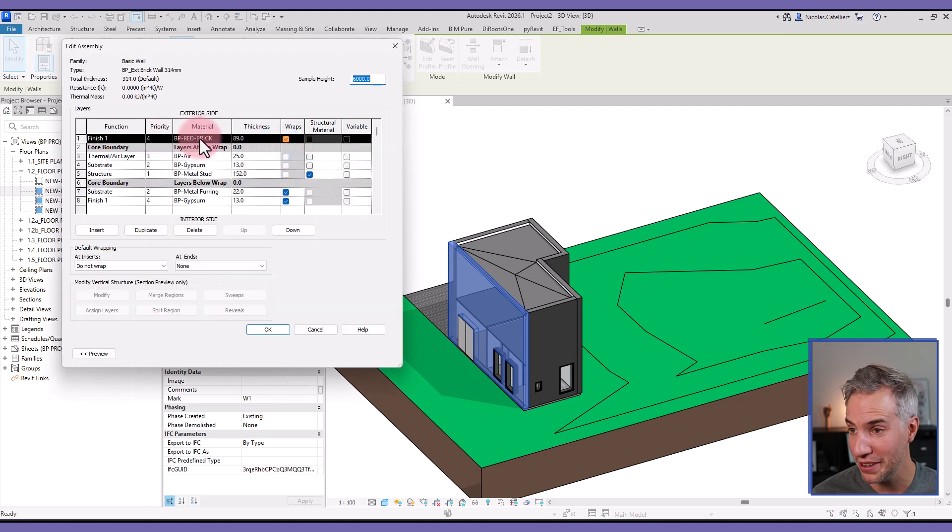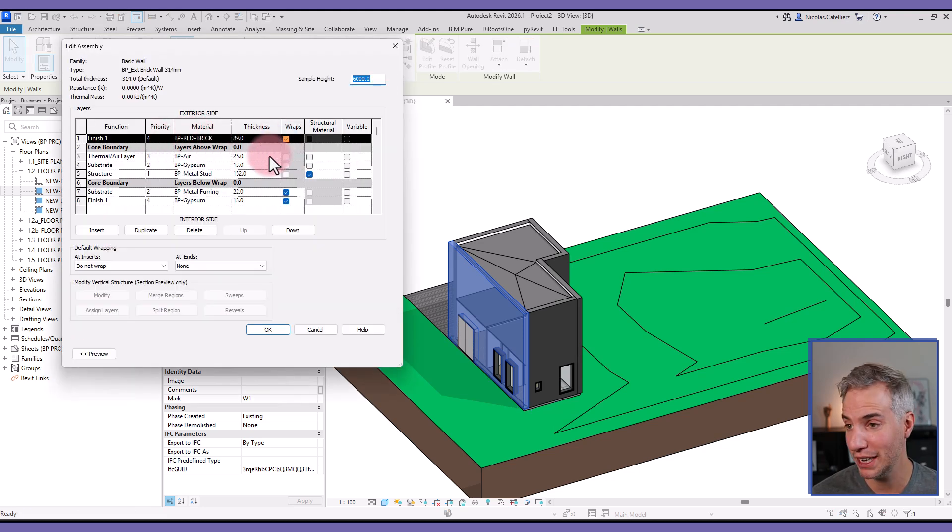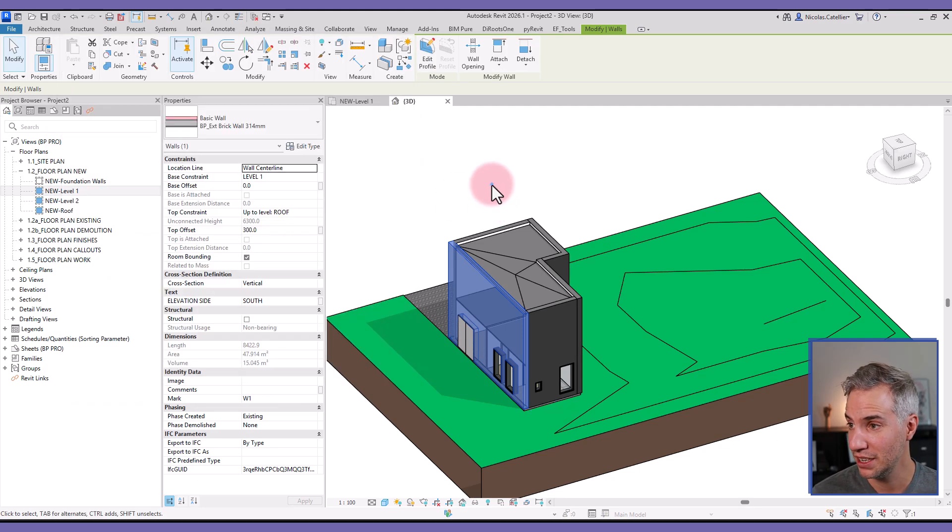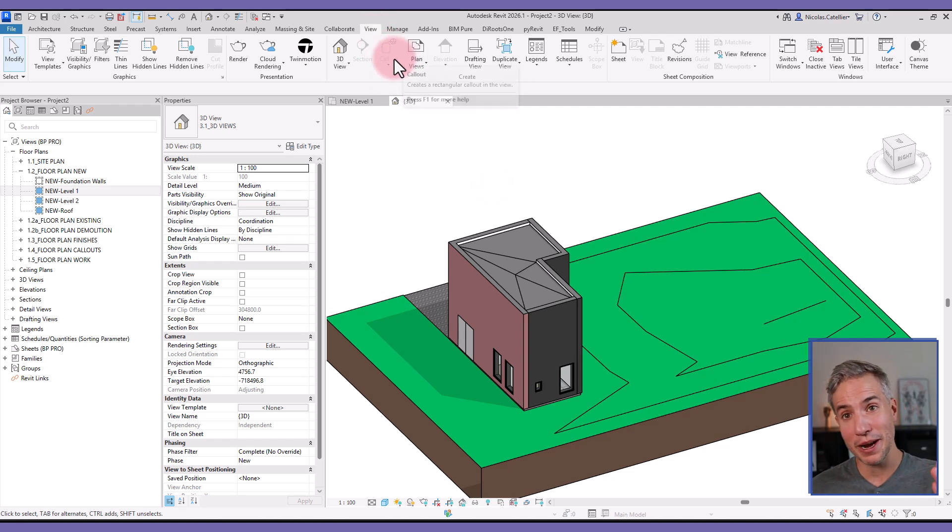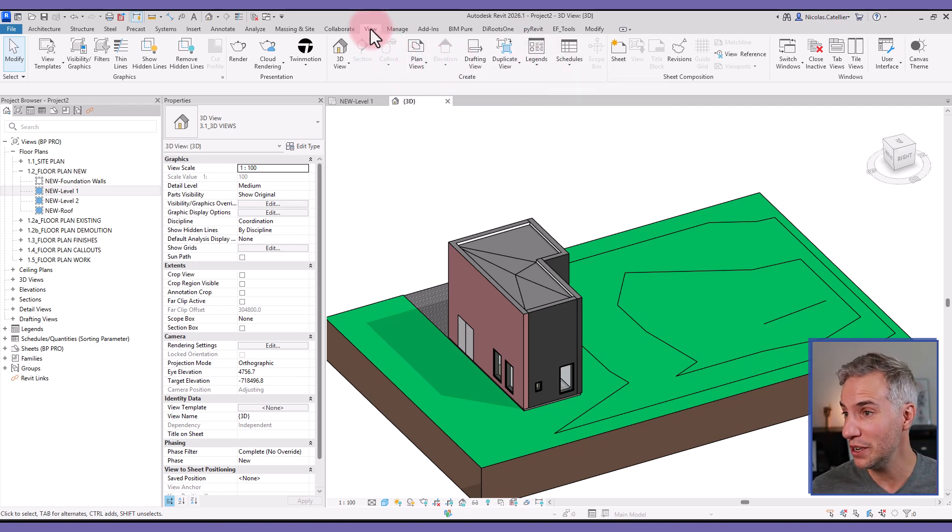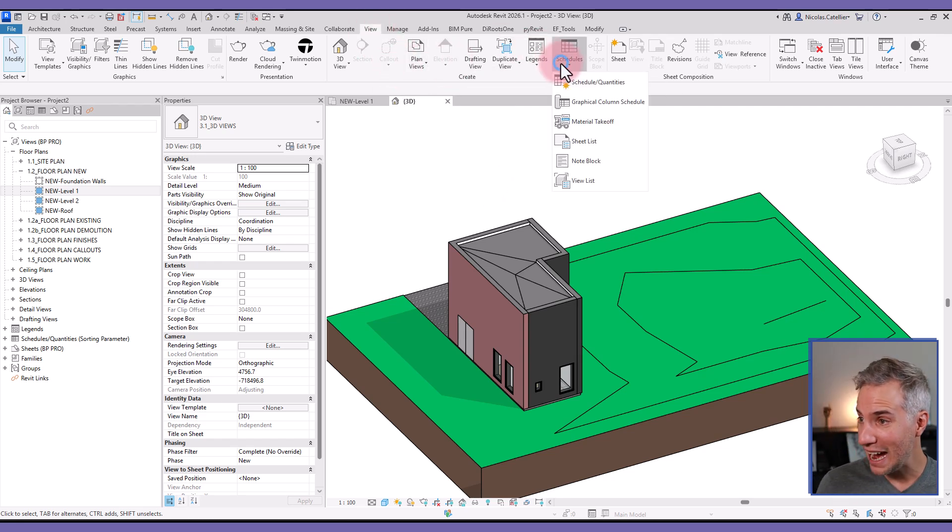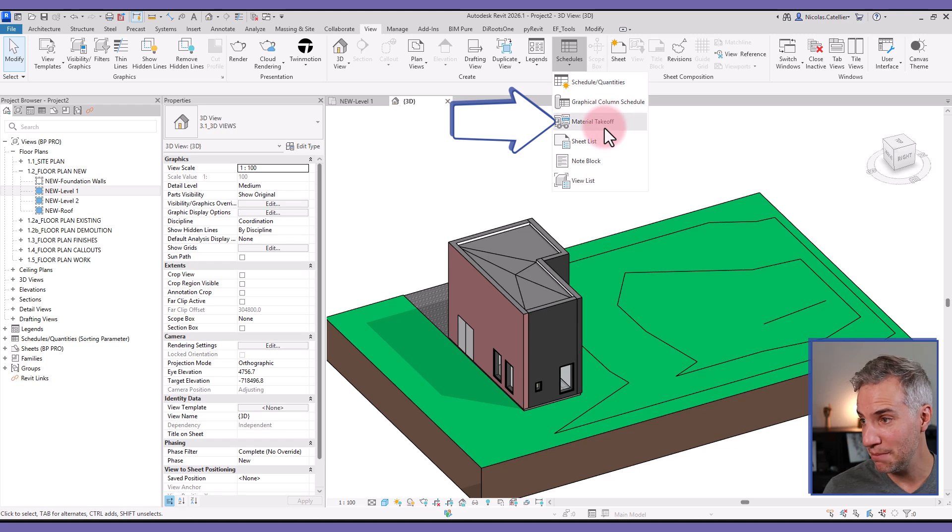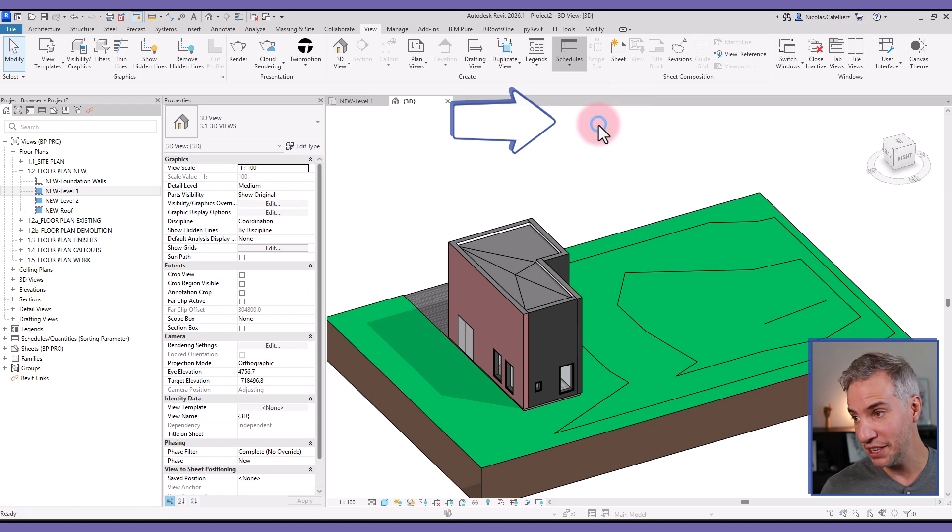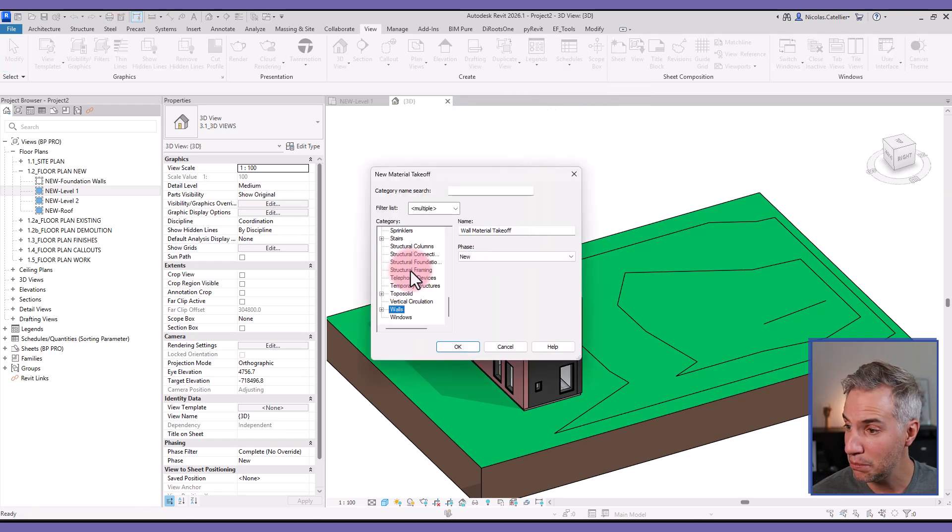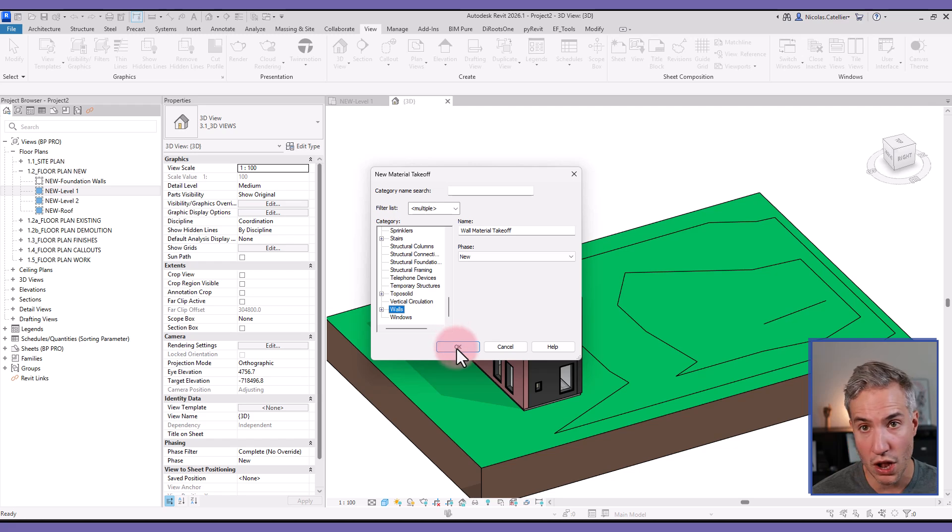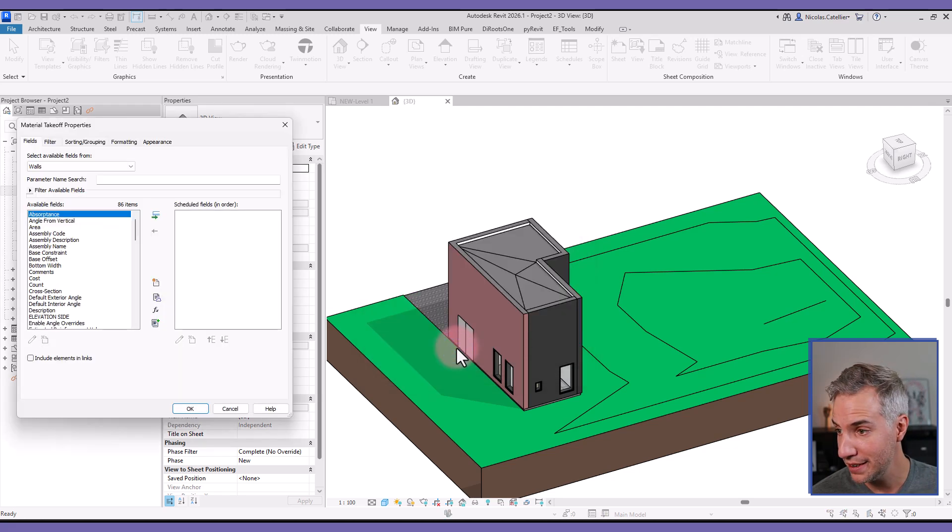So now I'm ready to create my material takeoff schedule. I'm going to go to the View tab, in the Schedules drop-down menu select Material Takeoff, and then I will press W and pick the Walls category.